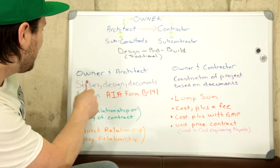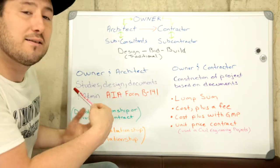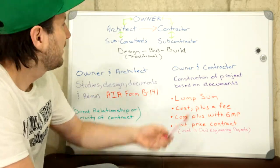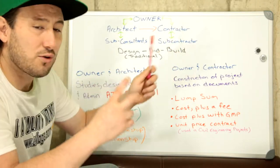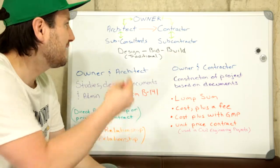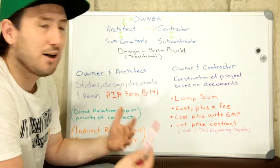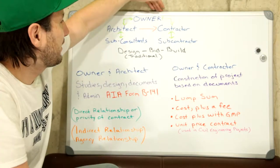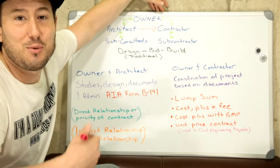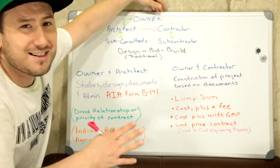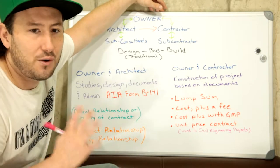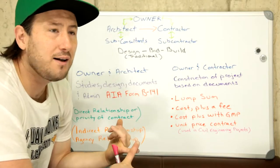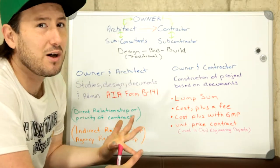After the documents have been completed, the project will go out to tender. Contractors will bid the job, and the winning contractor — usually the one with the lowest price — will enter into a contract. That's not necessarily always the case because there are many qualifications, but as long as they qualify and have the best price, they will get that contract.